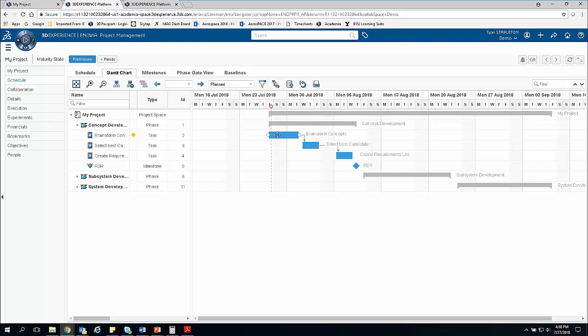Now one thing that we should also notice here, the way that my preferences are set up right now, when I'm marking days, it's only really considering business days. So you notice here I have Friday, it skips Saturday and Sunday and jumps to Monday, Tuesday. So that's 1, 2, 3 business days. So even though this is filling up 5 days, it's still only taking up 3 business days. By default, anytime I add a duration, it's going to skip over the weekends. Same thing's happening here. This is Wednesday, Thursday, Friday, Monday, Tuesday, Wednesday. And that's why these task boxes are right now composed of different lengths.